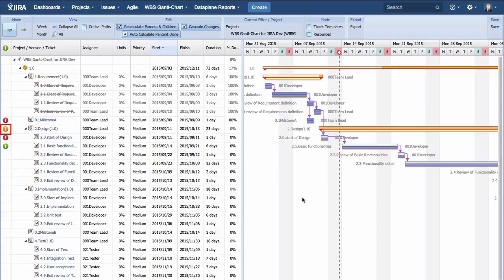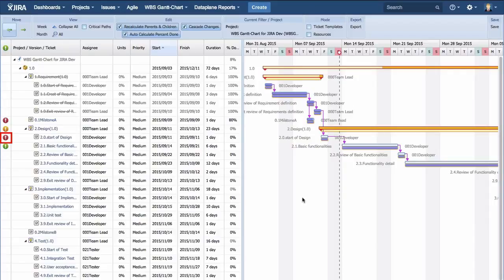The orange one means a ticket has passed its planned start date and has not started yet. The red one says that a task has not completed yet even after its due date.